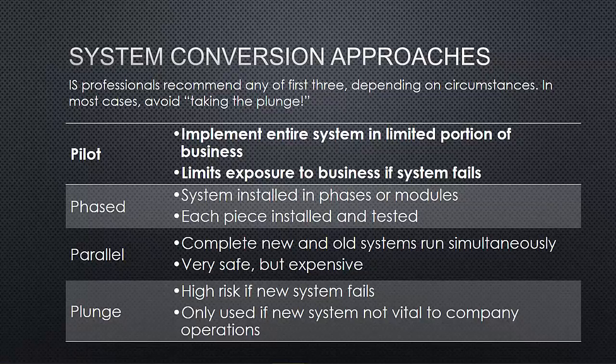Years ago, we went into a phased system when it came to our student information systems. It's a PeopleSoft, which was software that was designed to do a lot of different things for the university, and you interact with it daily. Schedules and fees and courses and all kinds of stuff was involved in this PeopleSoft implementation. And it was implemented in phases. So certain things turned over at certain times.